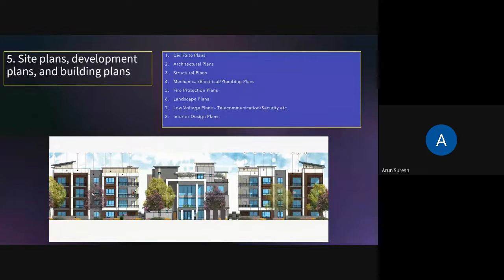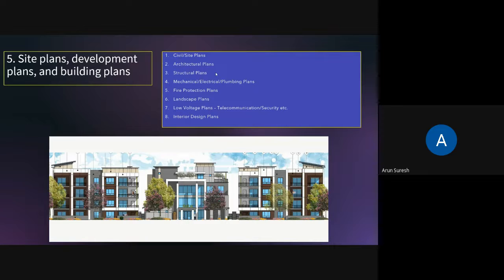Once the concept design is done, step four is to acquire the property and put an offer on the land. Once the land is yours, the next step is to produce site plans, development plans, and building plans. Various different plans are needed to build a project — site plans, civil plans showing all infrastructure and utilities, architectural plans showing how the units are laid out, where kitchens and bathrooms are, and how corridors are spaced. Structural plans give all the framing details including foundations.